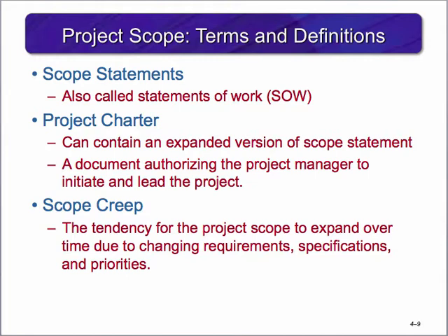It can be reduced by carefully writing the scope statement with as much detail as possible. In my line of work, we create statements of work for every project we do. It is crucial that we list what is and what is not included in the project. Many customers assume that the quote we provide them with is enough to complete the project, even if changes are made after the statement of work has been signed and approved. When project creep begins, it can start with the customer deciding to change the objectives of a training course or providing different technical specifications after work has begun.